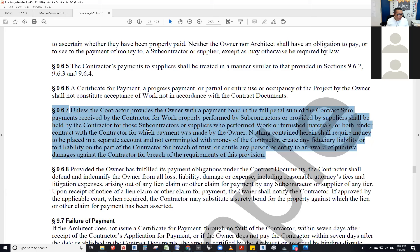Section 9, Article 9, is really all about that. Payment is so important because the lack of it will kill a project, and paying too much will cause it to run out of money so you can't finish the job. As the architect, we work for the owner and certify the payment to the owner — not even for the contractor. Our certificate says whether they're entitled to that payment or not.